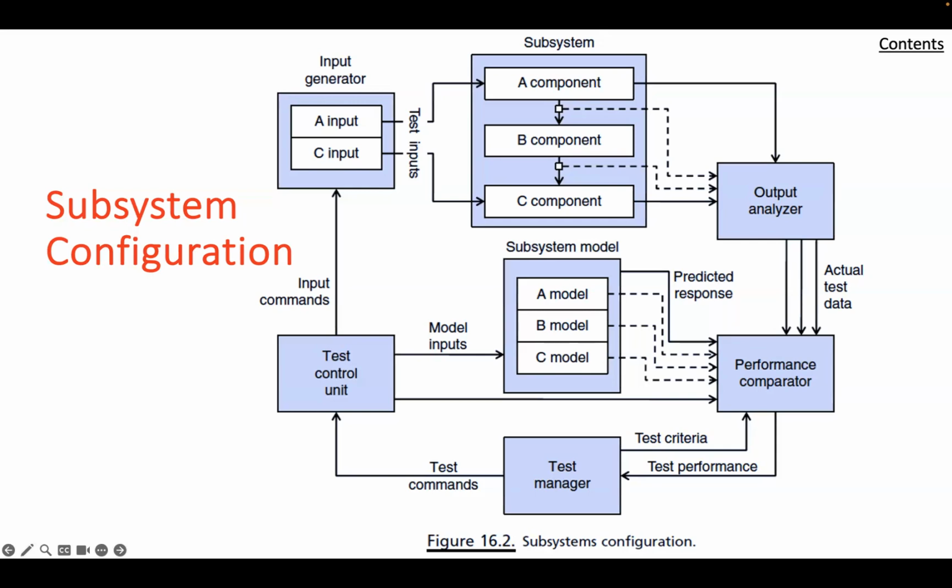The approach described above works in the great majority of cases, but must, of course, be carefully reviewed in the light of any special circumstances. For example, there may be safety issues that make it necessary to leave out or add steps to circumvent unsafe testing conditions. Temporary unavailability of key components may require substitution or simulation of elements. Particularly critical elements may have to be tested earlier than in an ideal sequence. System engineering judgment must be applied in examining such issues before defining the integration sequence.